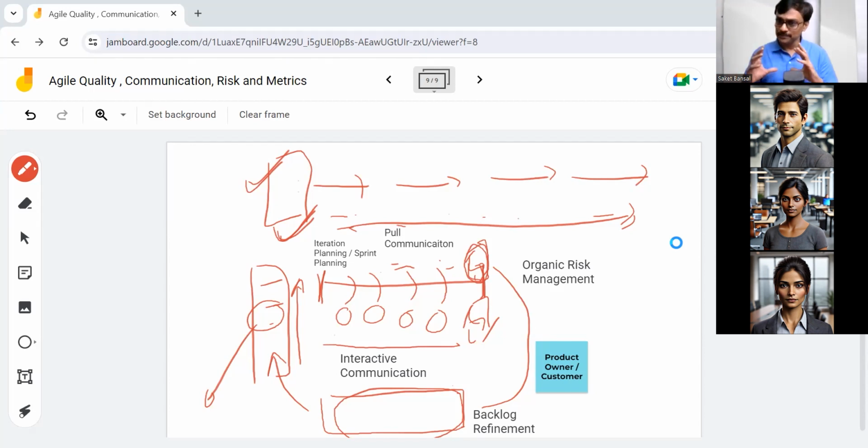But it is a project artifact: identification of risk, putting the risk into the risk register, prioritizing the risk, reporting the risk in frequent management review sessions, highlighting the risk to an appropriate stakeholder, identifying what kind of response strategy we should take. By default, all this is the topic of your PMP exam, and they are expected from the project manager, and they get tested in the project manager interviews as well.